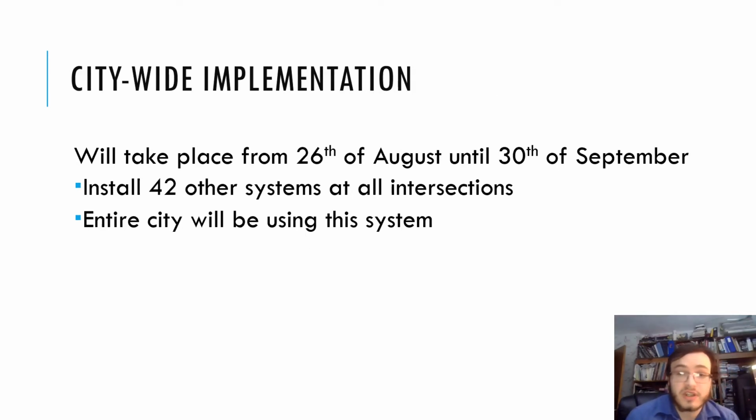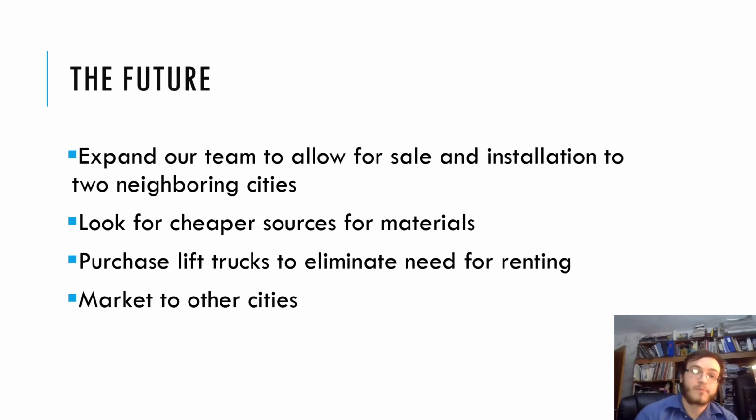Citywide implementation lasted from the 26th of August until the 30th of September. We installed the 42 other systems at all of the intersections, and the entire city was using this system. This entire phase went just as planned because we were able to build the units in the last section. We were able to get 1 to 2 units up a day, and it went smoothly.